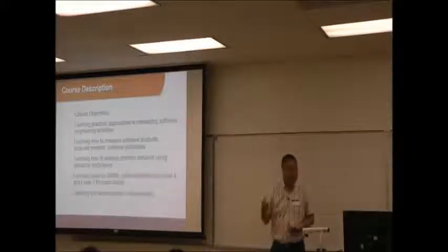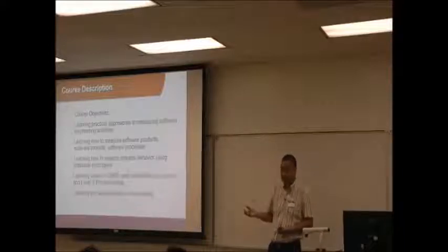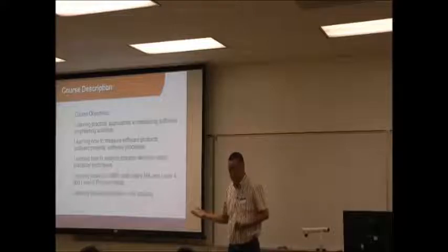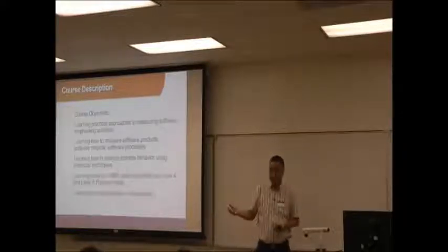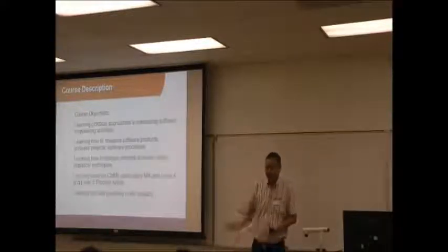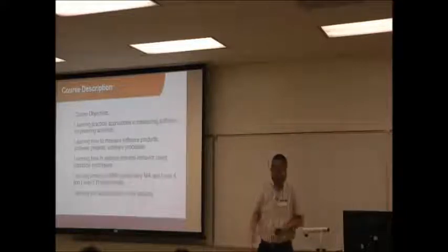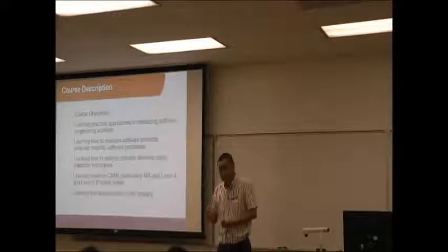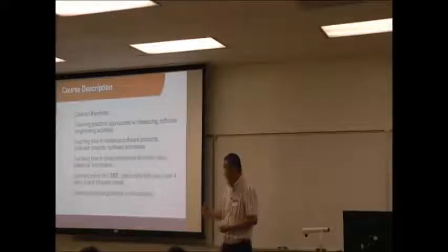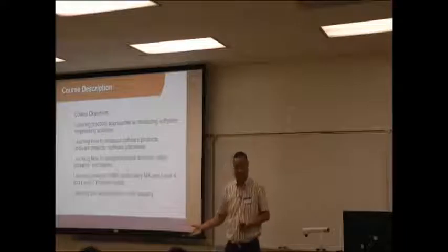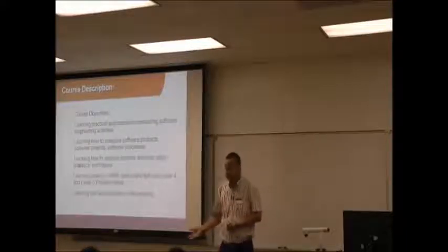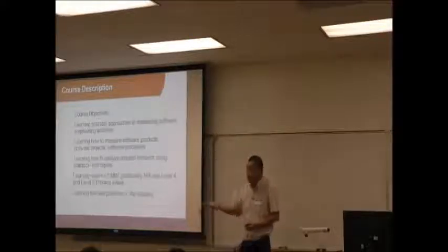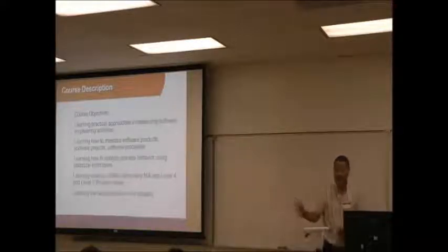Bill Gates mentioned, measuring software size by lines of code is like measuring the progress of building an airplane by weight. Okay? So I don't know, it's 1,000, I have no idea how much an airplane weighs. If I build half of that, that means I'm halfway there? No. Right? So when you write the code, the whole thing is 100,000 lines, and you finish 50,000, that means you're 50% done? No. Okay, and it's just a simple example.